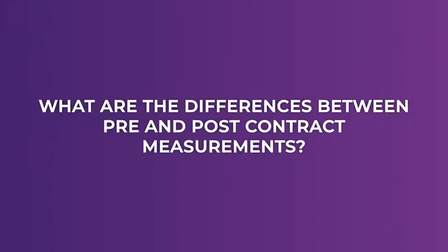Initially, you will carry out a high-level estimate before. It's called pre- and post-contract. So contract is when you'll hire a contractor, a building contractor, to work for you. The pre-contract stage is the build-up with working with the client to determine what's their budget, roughly what's the scope of work they need to do, using market rates to come up with the estimate. Then you'll come up with a more refined, detailed bill of quantities or activity schedule that you use to go out to tender, which is going out to market to find a contractor.